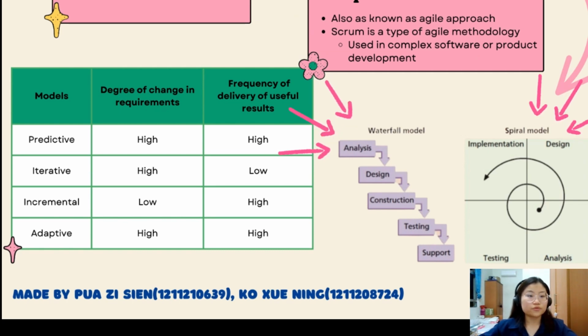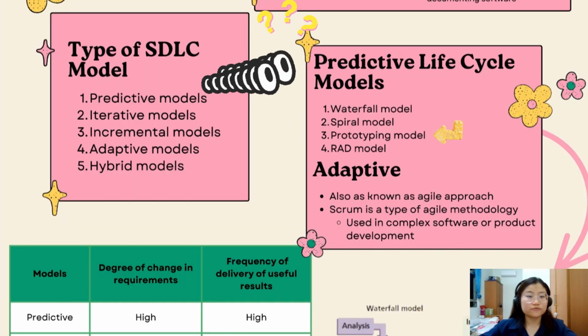The prototyping model is used for developing prototypes to clarify user requirements. The prototyping model is a system development method in which a prototype is built, tested, and then rebuilt as necessary until an acceptable outcome is achieved, from which the complete system or product can be developed.